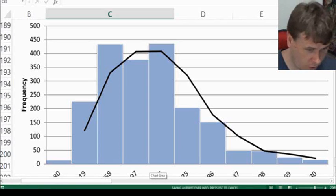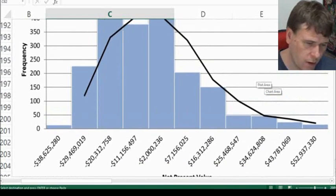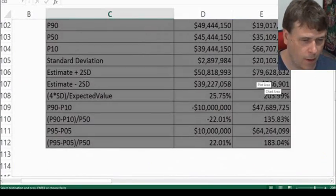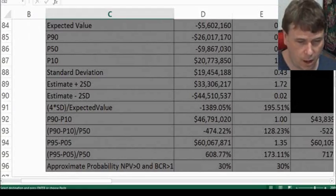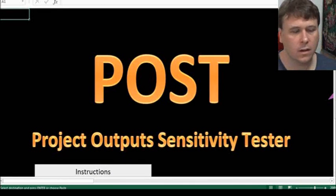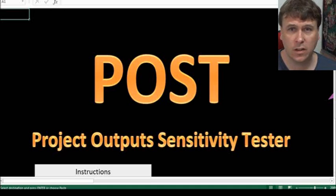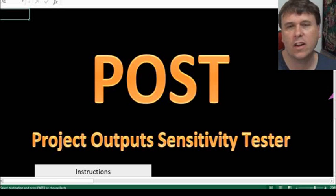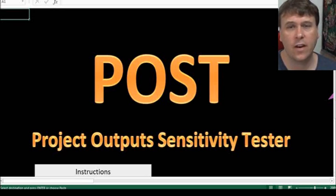We've got about 400 results that fall within this range for net present value — just below zero, which is roughly where P50 is. That pretty much takes us to the end of this presentation. So this is the model — you've got to do a lot of the work beforehand using your own tools and models, produce the results of your sensitivities, then do a simple paste of values without formatting into here. You can run Monte Carlo simulations or calculate based on probabilities to get your distribution of results. This is very useful when you're comparing projects that have very similar net present values and benefit cost ratios but you want to distinguish between them, and risk can come into play.